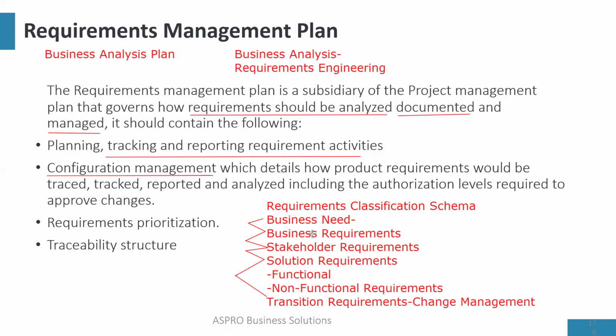So when we want to track a requirement, we can track it back to, okay, the reason why our petrol pumps have ATMs is really because we are modernizing. Well, we can trace it back to the business need. It's because we are modernizing, and that's what's currently in vogue. So, for every functional requirement, we can trace it back to the business need.